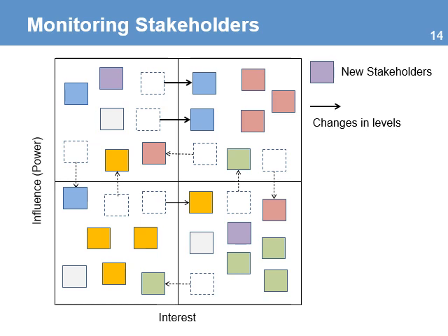In the planning phase, you identify each stakeholder in this matrix. But as the project makes progress, some stakeholders might have changed, and now they have a different level of interest and influence. The original strategies don't work anymore, and you need to reevaluate the matrix and change the strategies. For example, you're going to see that some stakeholders that had low interest now have high interest, which is good. It means that your strategies had an effect.